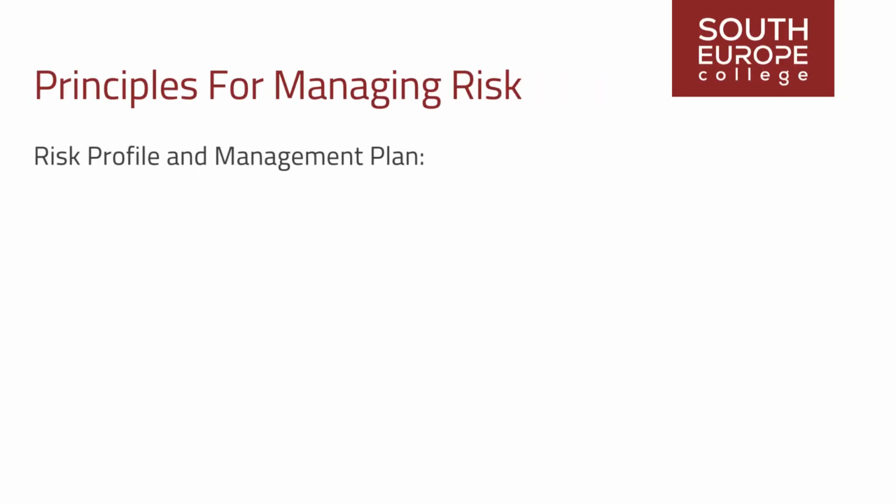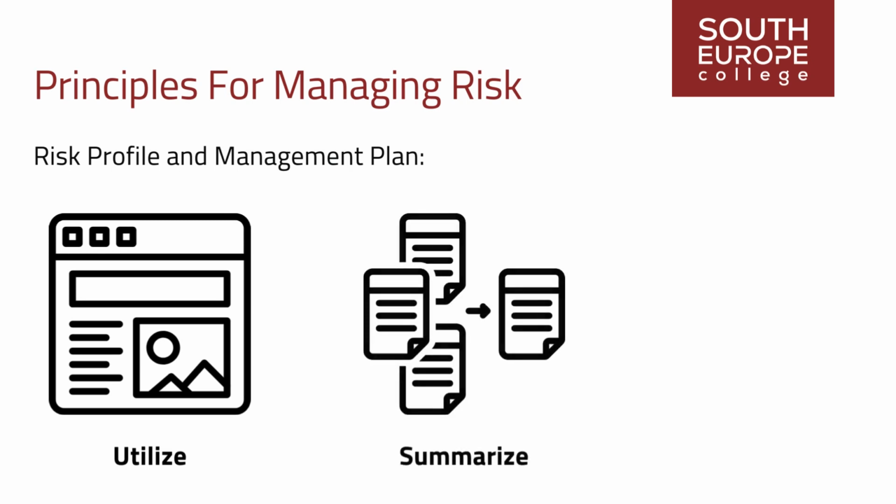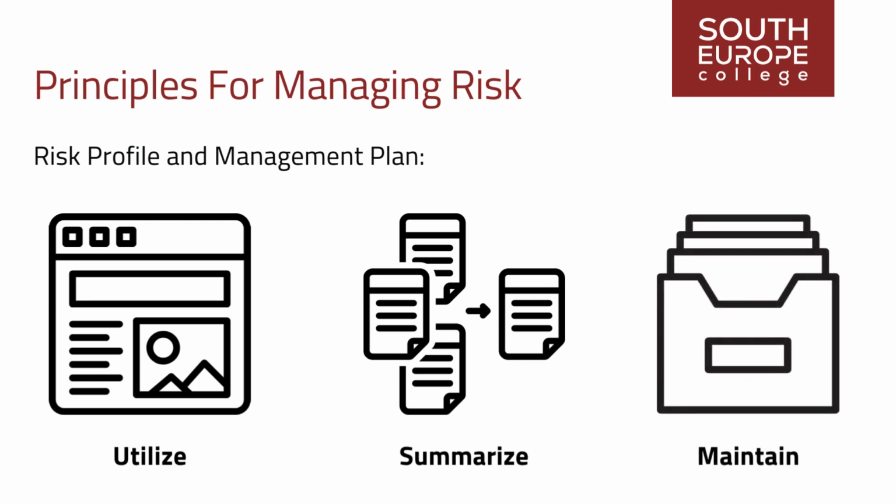Risk profile and management plan. Utilize a template for the profile and management plan of identified risks. This document should summarize all available information about the risk. Maintain this document in a centralized location, such as a binder or library, and update it as needed until the risk is officially closed out or considered no longer existent.